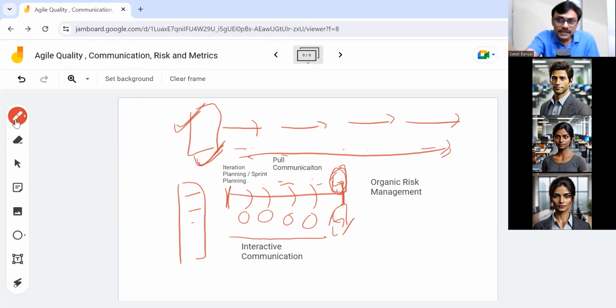Yeah, no guide or book can tell you which people should come to an iteration review meeting. You as a project manager, in a hybrid approach, I'm using that word rather than Scrum Master, have to identify who the right people are to attend the iteration review. So those right people should be there. In an iteration review, you will show them the work you have completed as per the definition of done for that particular set of stories and that iteration stage. Based on that, you will take feedback, and stakeholders will talk about the things they are worried about for the future. Now, these feedbacks and risks for the future will be an input for our backlog refinement activity.